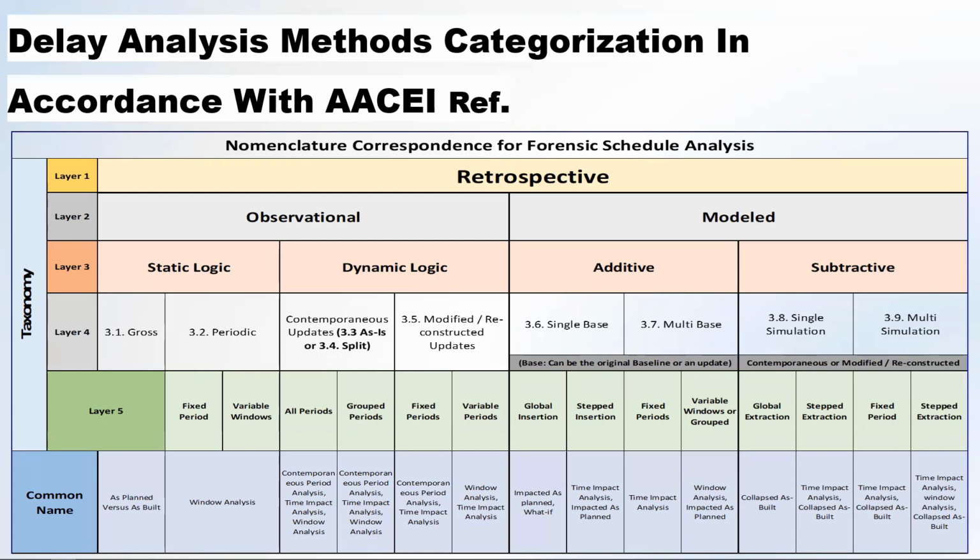We are doing a construction project. The contractor is the owner of the sequence, and the contractor can do whatever he wants, not to a limitless extent, but he can use the site circumstances to adjust the sequence, do a section before a section, do a floor before a floor, especially in fit out and MEP and roadway sections and interchanges and bridges.